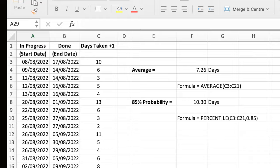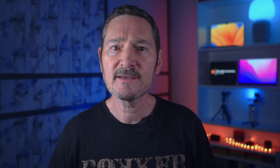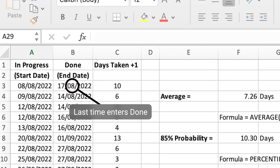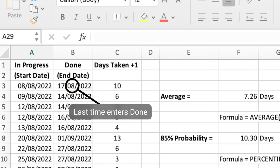It's easy in some tools like JIRA with the help of plugins. Other tools require an API call and others provide this data natively like Kanbanize. Once you extract this data, you can put it into something like Excel. You simply subtract the start date from the end date — in our case the date it entered in progress to the date it entered done — and add one day. This is because if a work item started and ended on the same day, without adding one day your cycle time would be zero. The date our work item hits in progress must be the first time it entered that state, and the date it entered done must be the last time, because work items often go up and down the workflow.